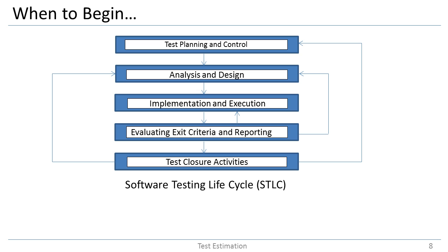Let's begin with test planning and control. Test planning determines the scope, objectives of testing, and test approach. The availability of requirements is critical at this stage. Test control is an ongoing activity of comparing actual progress against the plan and reporting the status, including deviations from the plan. It involves taking actions necessary to meet the mission and objectives of the project. Test plan and test estimates are the two test deliverables expected at this stage.